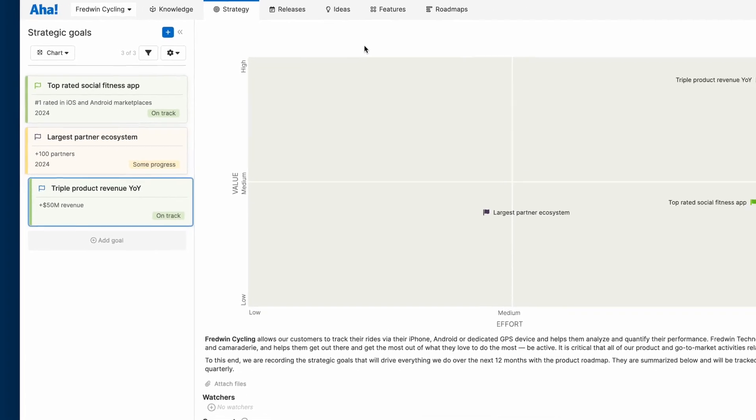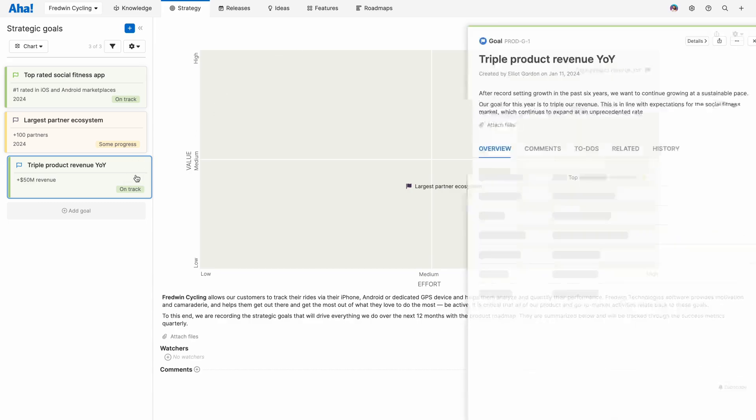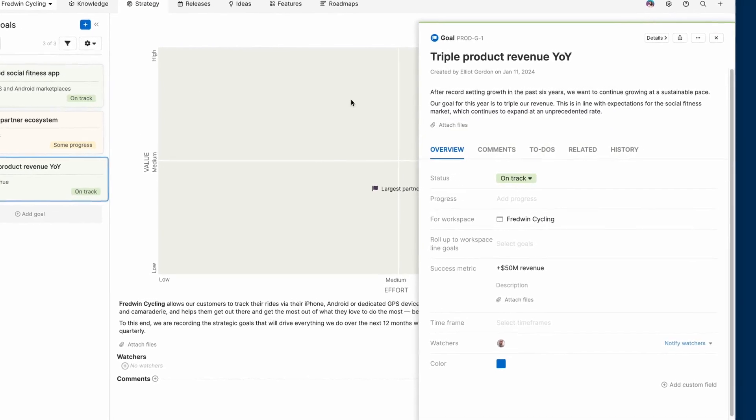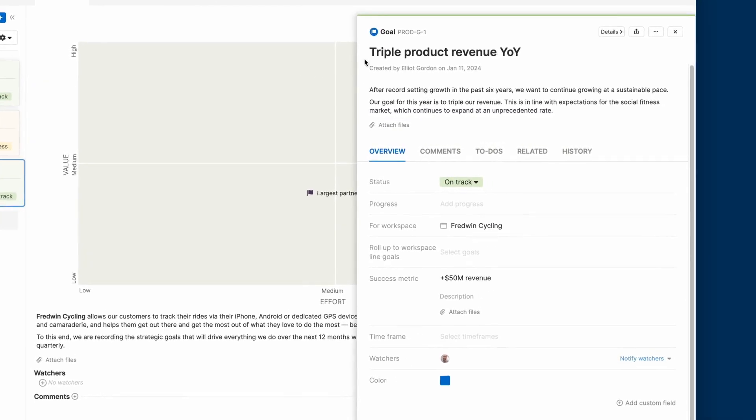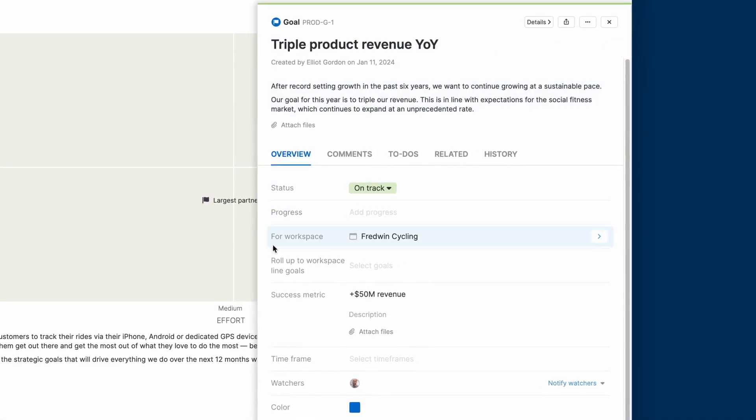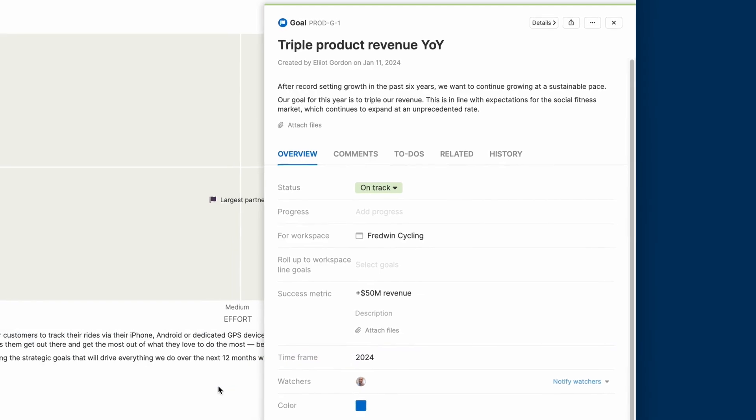As you can see, we've already defined our goals for the rest of the year. Now let's open one up and take a look. You'll want to give each of your goals a name, description, and a success metric that is both specific and measurable. Then we'll set a timeframe. This makes it super clear what we want to accomplish and when.